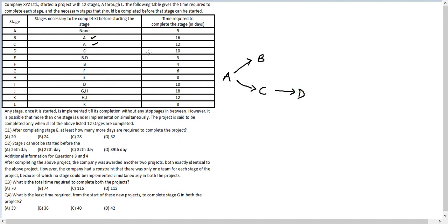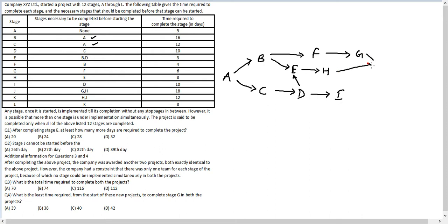After B, E can be done. The arrows are important — do not vary in the direction of movement. F can happen after B, then G after F. H happens after A. I happens after D. J happens after G and H, combining to give J. K happens after H and I. Finally, L happens after K.